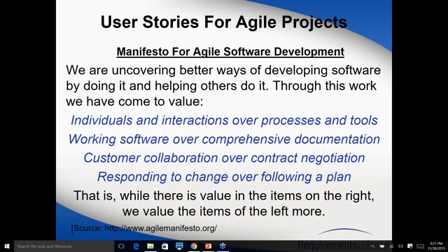So let's assume that after a couple of weeks of signing the requirements and giving the approval, there is some new requirement which is really needed by the customer. Poonam really needs that requirement, and she comes to us and says, we have to add this new requirement because it's not there right now and we need it. So as a PM, what I will say is, we cannot add this new requirement now because we have locked down this phase. You approved the requirements, there was a sign off ceremony, you signed the documents. Now you cannot add any scope to it. If you want to add scope, we have to go through a formal process, which can be done, but it cannot be just added based on minor discussion. It has to go through a process.